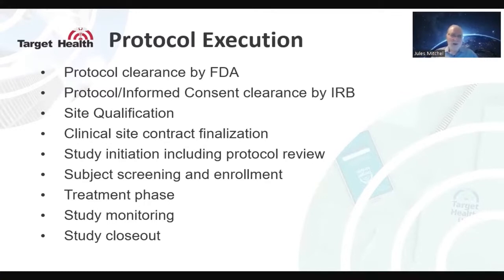And actually, I was just involved with another study very recently, which I'm helping on fixing problems. They didn't do the proper training. So it was a study where they took the drug home with them. And when they had a flare of their disease, they would take the drug. But they found that the people that were trained intensively were much more compliant in the study than those who weren't. So don't minimize training, both of the patients as well as the sites.